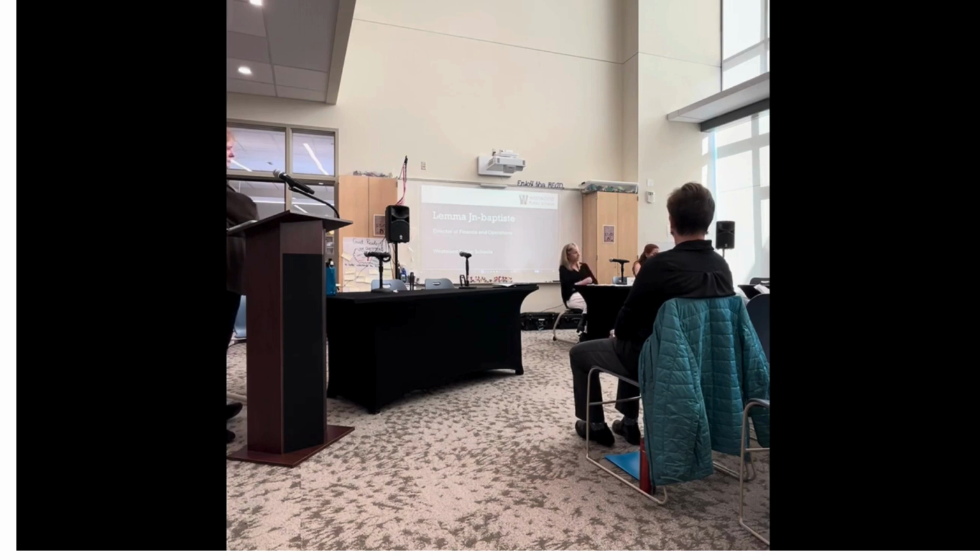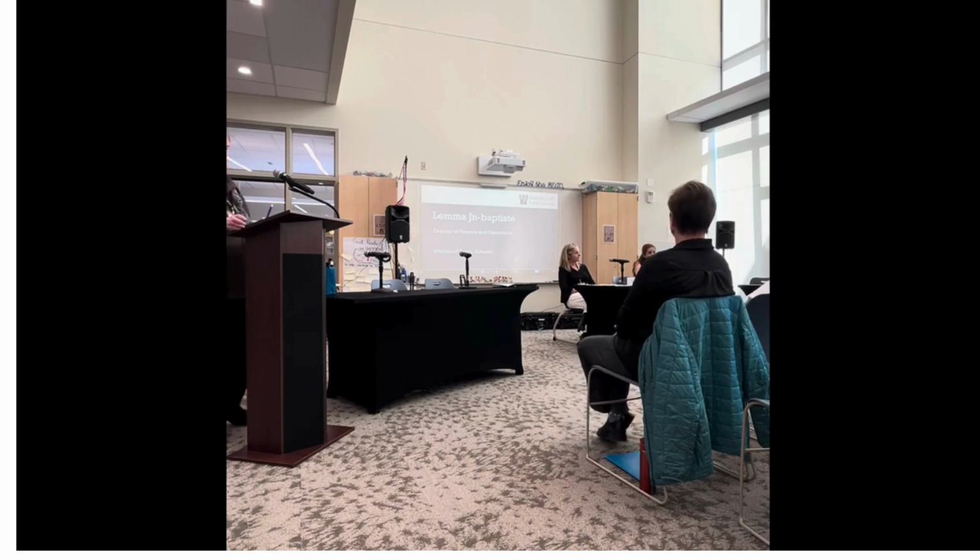And one thing that I have thought about is that they were careful not to inadvertently commit to a project budget before the full work of the SBC had really, before they had gone through the course of the decisions that they needed to make around what this building looks like. So I think that was an important choice that they made.